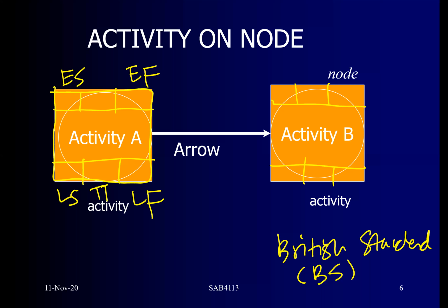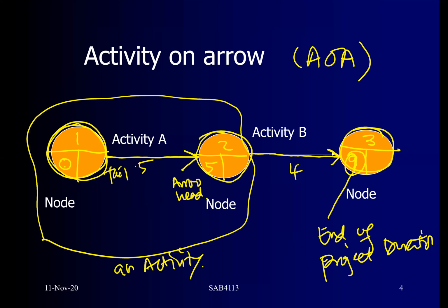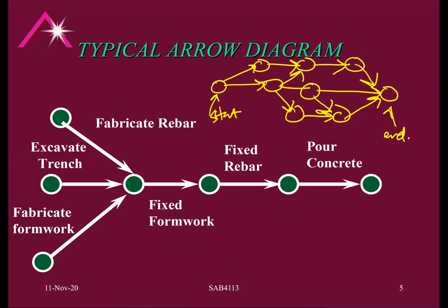And then this one is the total float value. And this one is the duration. Let's say, as in our example, duration is 5 days. This one is 4 days. And how do we calculate? 0 plus 5 equals 5. 5 then transfer here. 5 plus 4 equals 9. You see, the project is completed in 9 days. Similarly, in this diagram, 9 days. But the graphic looks different. But in terms of the concept of calculation, they are the same. You should get the same answer.